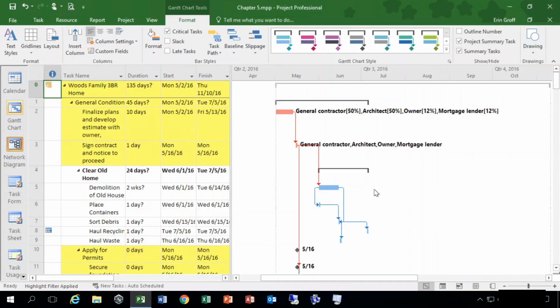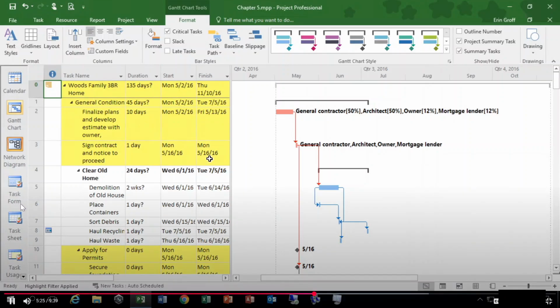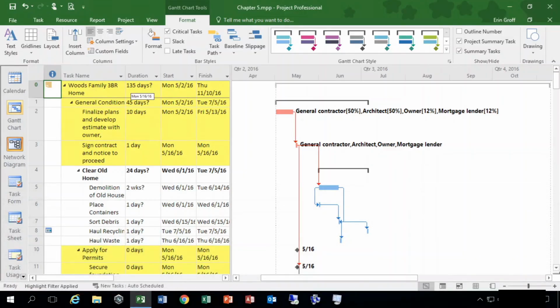All right, so again, just to repeat, these are the tasks that are going to affect your end date. So if you take a look at these as you're analyzing your project and take a look at the resources that are assigned to them, maybe you can add additional resources to shorten the duration. Shortening the duration of one task can have a major effect on your project end date. Okay, so being able to actually depict which ones drive the critical path is very important.